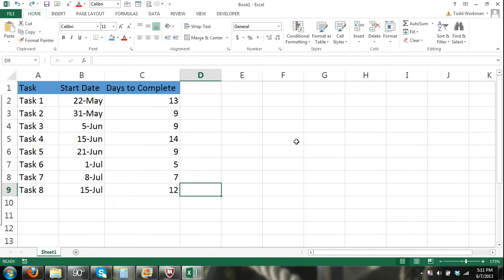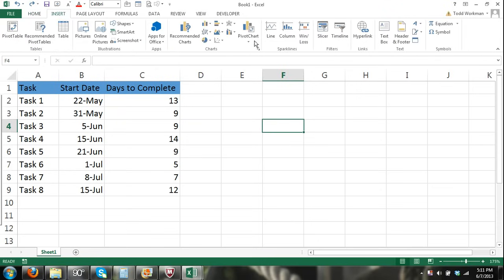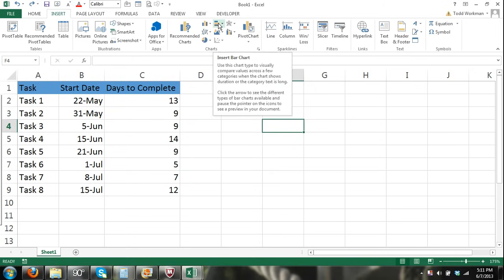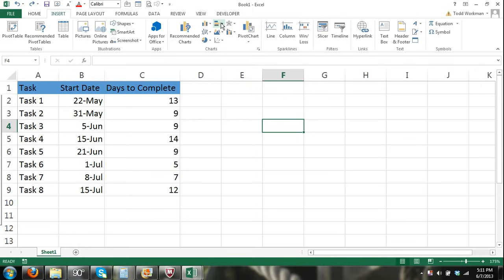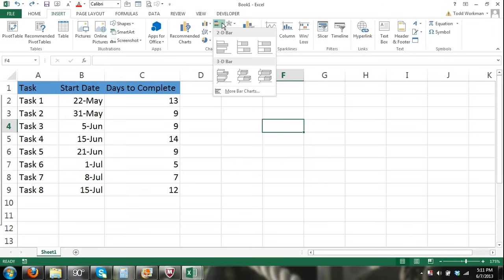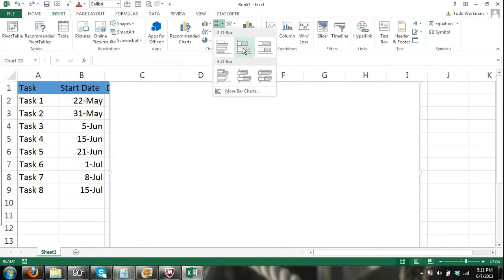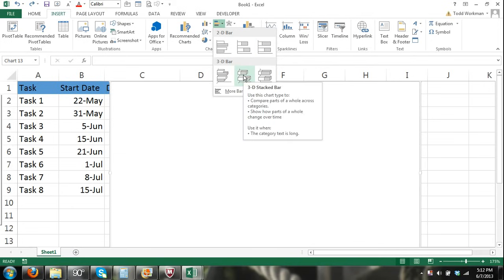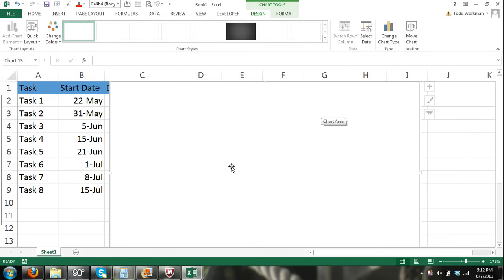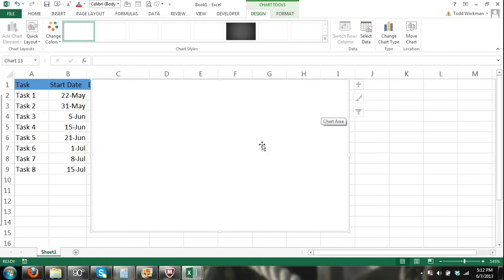Now we can go ahead and start creating our chart. Click the Insert tab and in the Charts group select Insert Bar Chart, which is basically a sideways bar chart. We're going to click on either the 2D stacked bar chart or 3D stacked bar chart — I'm going to select the 3D stacked bar chart, and a blank chart area will appear.